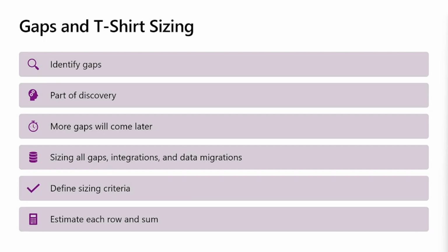But depending on the complexity and the size of your project, you'll need to decide what the right sizing criteria is and estimate for those sizes. So you might, by and large, do small, medium, large, but then have two really, really big ticket items that you estimate the effort for individually, outside of your standard small, medium, large approach.